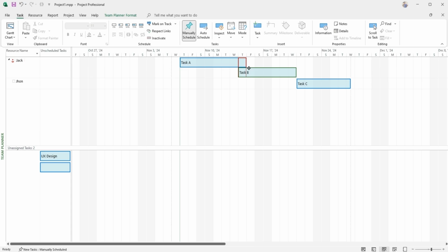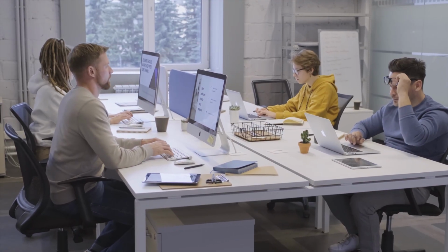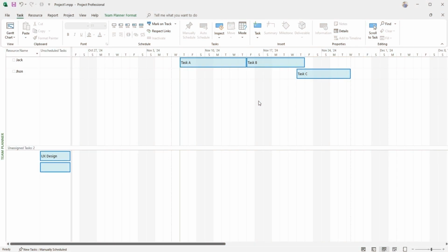In cases of over-allocation, when a resource is assigned too many tasks within the same time frame, your project could risk delays or reduced quality. Properly managing this allocation keeps tasks balanced across your team. With the timeline view and drag-and-drop task assignment, you can efficiently balance workloads and prevent over-allocation. If a task needs to be split, assign segments to different team members as needed, ensuring a balanced, manageable workload for everyone involved.